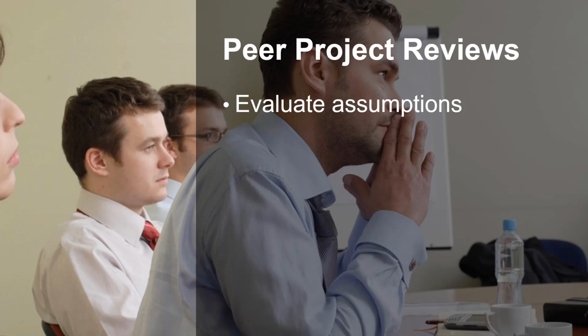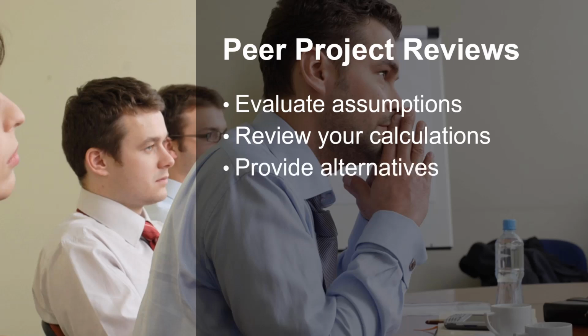They may review your calculations and estimates for time and costs. They may check for errors or inconsistencies. For example, you may be using an outdated cost basis, or perhaps you did not account for holidays or vacation time in your schedule. Based on the information you share, peer reviews may provide alternative solutions, interpretations, and suggestions.